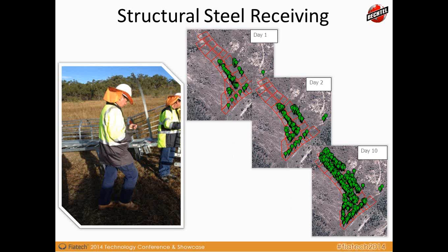So you'll see that we get a lot more information a lot quicker. Remember the 45-day thing I talked about there. What we found is that the overall impact on the steel receiving process reduced the time of completing the structural steel receipt from the 45 days on the previous side, start to finish, to an average of around 22. So you can see that's a significant saving on time on the information lag. And going back to the 3 pillars of the paradigm shift, we were able to prove this by collecting the data and running the reports on that, figuring out that we could essentially halve the overall steel receipt from the 45 days to the 22.